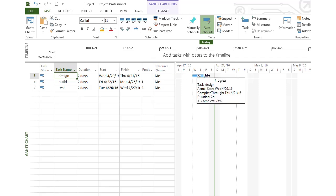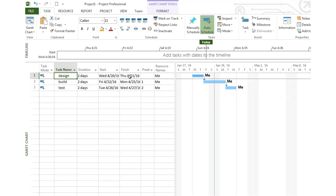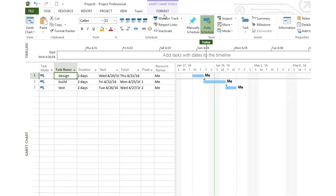There's this darker blue small bar that appears on my task bar. But if I'm marking the progress as of the 22nd of April, then I want to mark that as 100% complete, because that task should have been completed on the 21st. If I'm on schedule, I'll say it's 100% complete. I could also have marked it as on track, and that would be the same thing. If it's on track and it only took two days, and I'm updating the status as of the 22nd, then it's 100% complete.